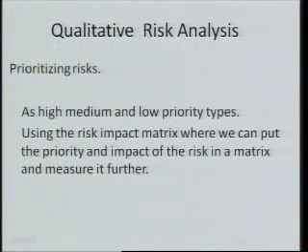Further, we have seen the analysis phase, wherein we have seen two things, the qualitative analysis and the quantitative analysis. Qualitative analysis talks about prioritizing and categorizing the risks, whereas quantitative analysis talks about making use of a wonderful statistical method that lets the project manager take the right solution for the risk that has occurred.